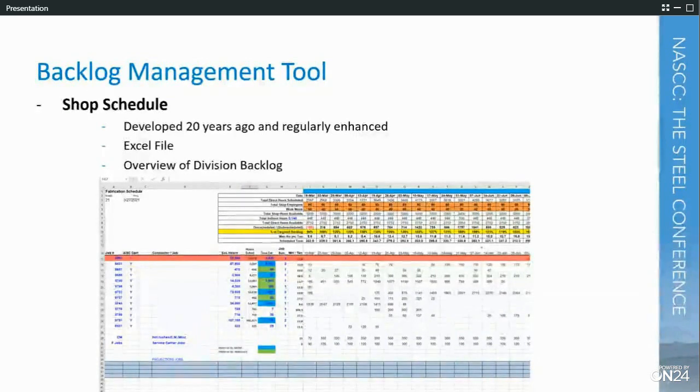And what we're basically doing is we're comparing the amount of hours we're scheduling based off of the projects that we have, the estimated hours, and the customer commitments we've made. We compare that to our available capacity. So right there we have a good idea of, okay, we're scheduling all these hours, and this is the amount of time that we have available in our shop to support that. And basically this is the dashboard, the overview, where all of our individual information is going to feed to.